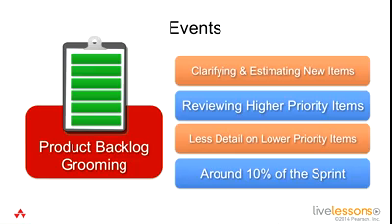And you have to remember that that's part of the overhead of just-in-time requirements, and you need to plan for it. So don't fill up your entire sprint with items you're going to be working on and forget that you need to dedicate that 10% of time to grooming the backlog with your product owner.